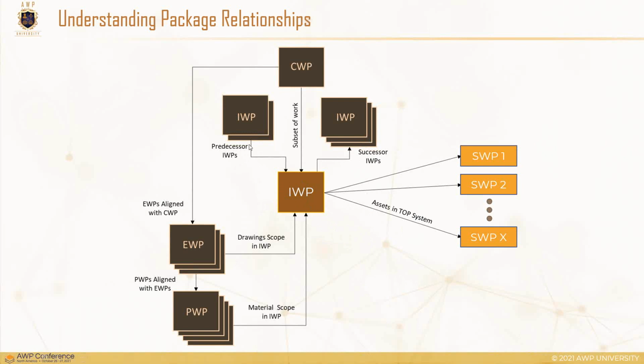Obviously, schedule comes into play, but when we're scheduling those IWPs, we're scheduling them thinking about gravity and constructability more than we are logic ties, and creating the schedule for the IWP execution based on when the other items need to be done and when they have been executed.